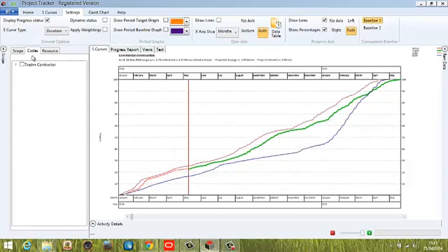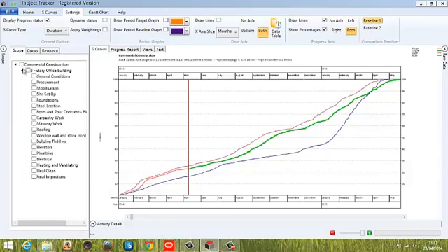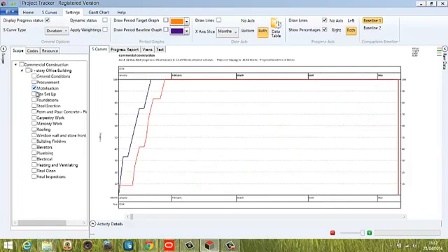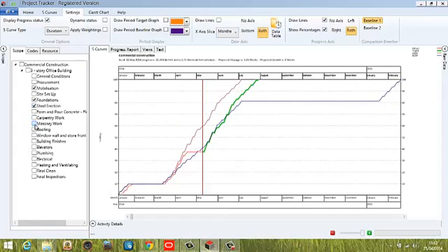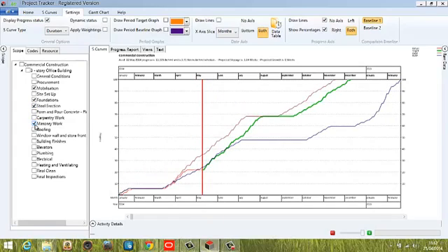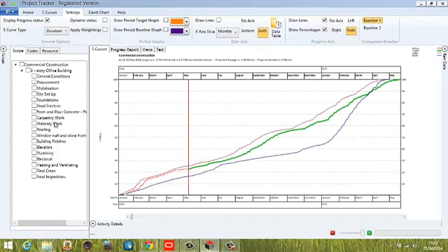Now we also bring in activity codes, color codes from your planning tool, and also resources, be it permanent resources and also consumable, so material resources as well. Now just by clicking into a particular area of my program, you can see here that the S-curve would appear in here. So it supports multiple selection. So if I wanted multiple WBS, multiple projects within my portfolio, Project Tracker will handle that. So it's just a very simple click, and as I take them away, it goes back to the program.